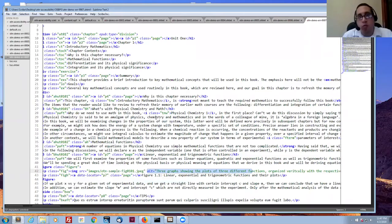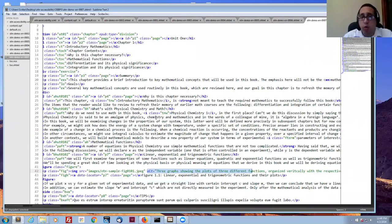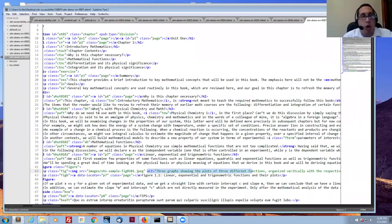I wanted to add to this to blend things together: As John said in the beginning, it's good to get the images done as early as possible because in that way you can deal with alt text right at the beginning. For example, let's say you have your manuscript completed and your images set up—you can already go ahead and start creating that alt text so that way you already have it and it's not something that's an afterthought or added later on.